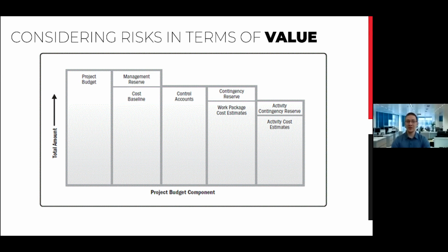The first one is intended for handling difficulties and delays in already planned operations. The second one is intended for doing the additional work that we have to do in case of a risk occurring. Regarding management reserve, this buffer may be used only for handling unknown risks impact and nothing else.